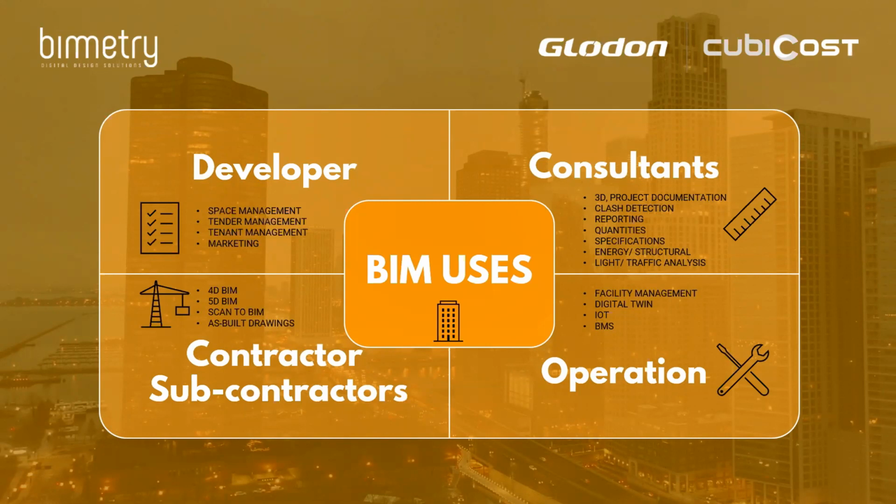Companies are also starting to make 5D sequences more often, where the animation is not only linked to the program, but also to the financials. And this is where you, as cost estimation professionals, might want to get involved as well, to test various scenarios in terms of the 4D sequence and what would be the impact on the budget.